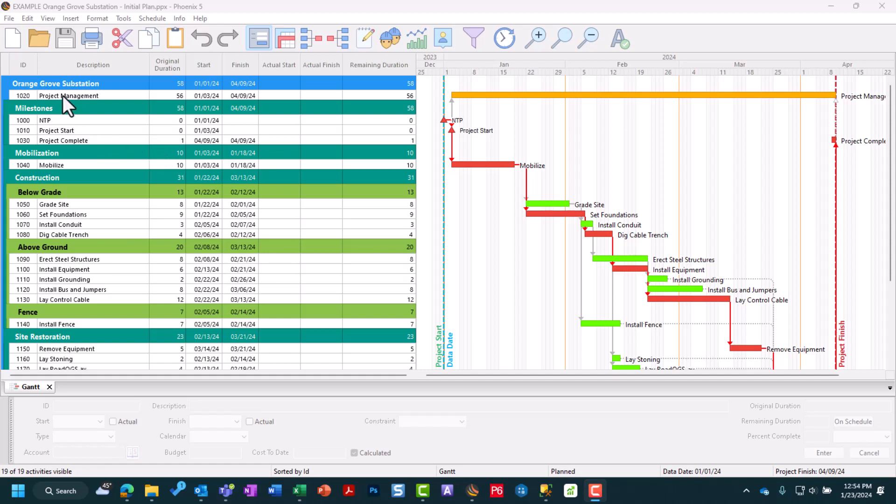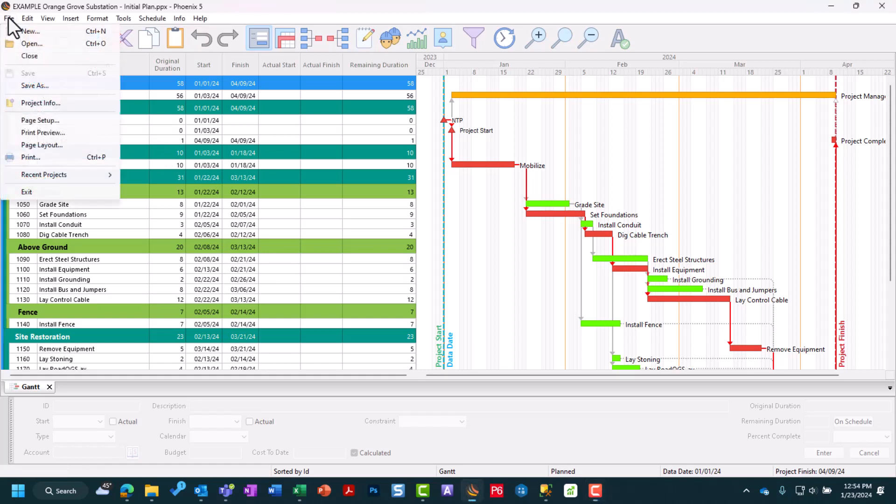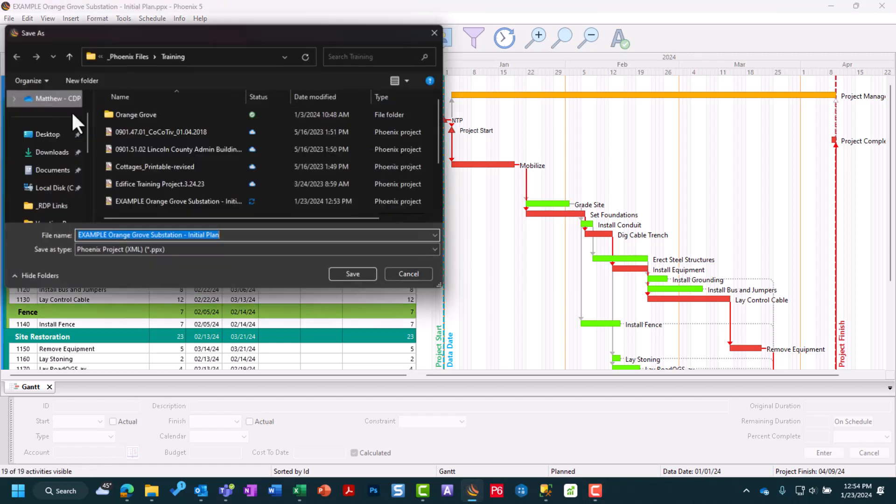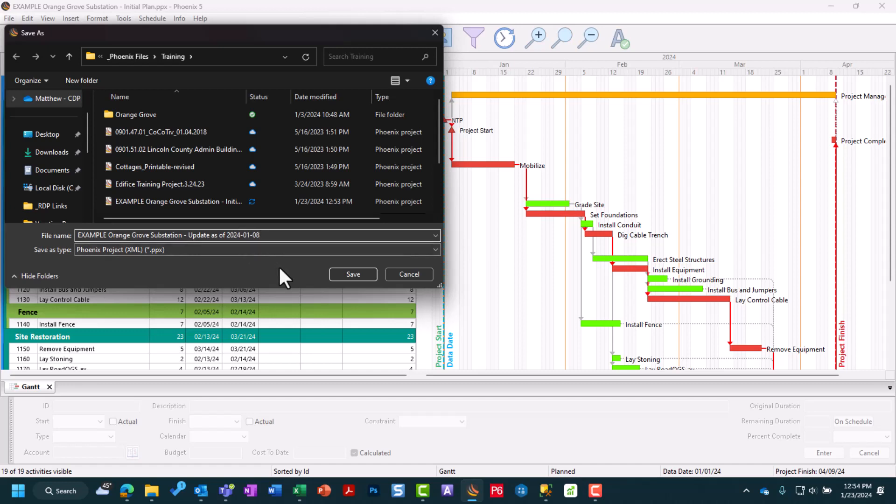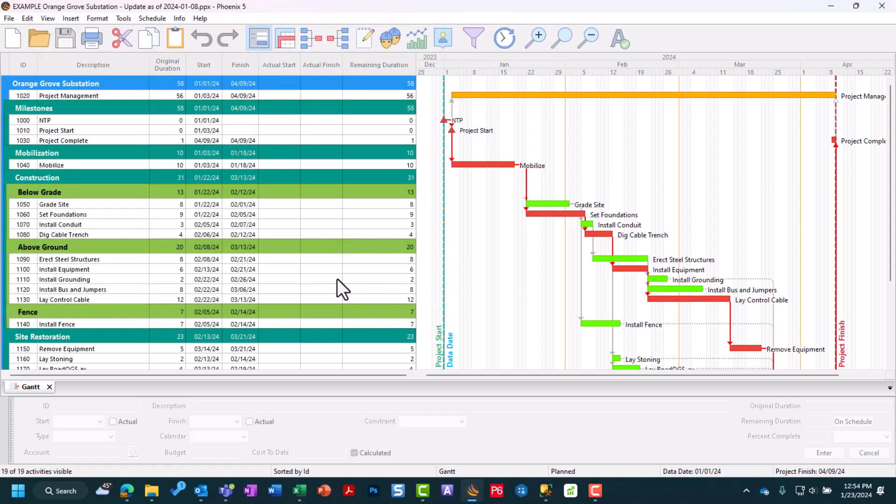Now that we've created our backup, we can get ready for our first update. Again, we're going to go back into that File, Save As menu, because now we want to date this with the date of our update. Our date is going to be January 8th, 2024. So we're going to give it that update name, and eventually we're going to advance our data date to that specific date as well.